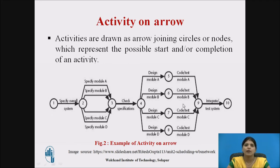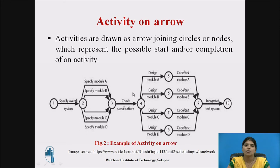Here, nodes 1 through 10 represent events, and each pair of nodes is connected with an arrow representing an activity. From node 1 to 2, we specify the overall systems. From node 2 to 3, there are 4 modules — specify module A, module B, module C, and module D. From node 3 to 4, check the specification. From 4 to 8 and 4 to 9, there are 4 intermediate nodes for design modules A, B, C, D. Finally, from node 9 to 10 is integrating the overall system. This is activity on arrow — the activities are represented on the arrows.